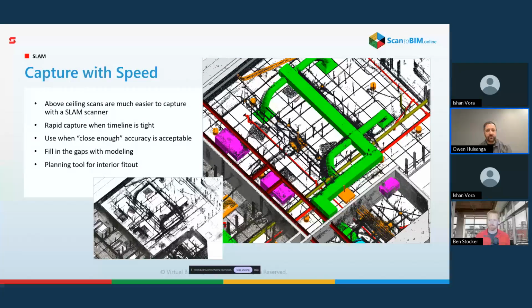This allowed us, if you look at some of those orange elements, to place a couple of junction boxes here and there, and boom, now we could tell, oh, that's conduit, not pipe. We started to color code some of these elements to help our construction team and trade contractors understand the scope and what was actually up above. This project was originally scheduled to come in at about 6 weeks, and with some of this early construction planning, we were able to cut that down to a 4-week schedule purely because we had started to plan early.